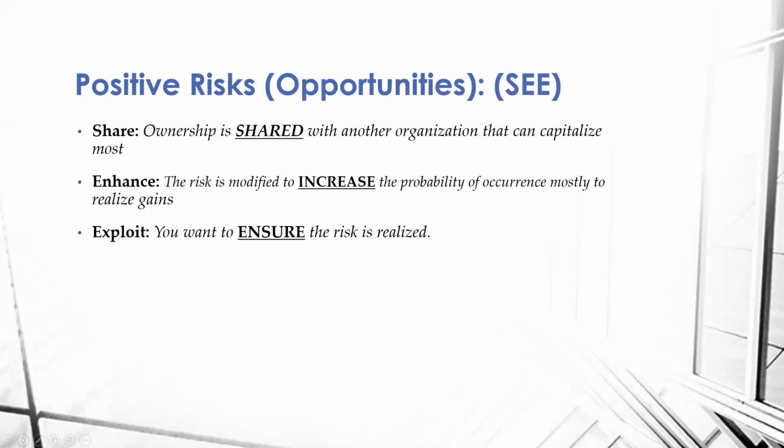Share is where ownership is shared with another organization that may capitalize the most from the risk. Enhance is increasing the probability of occurrence, most likely to realize any gains. And exploit is doing everything in your power to make sure that the risk actually happens.